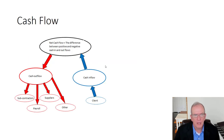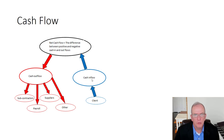When we think about cash flow, you should think about it in two ways: the amount of money going out on a project and the amount coming in, and how they compare. If you have more money going out than coming in, you have a shortfall. The big question then is: do you have the liquidity to manage through that shortfall? If you don't, the business is done — if you can't pay people, nobody's going to work for you.